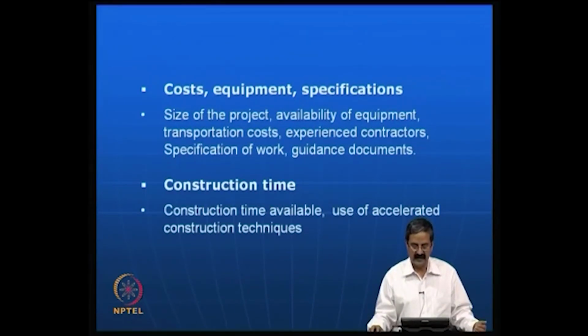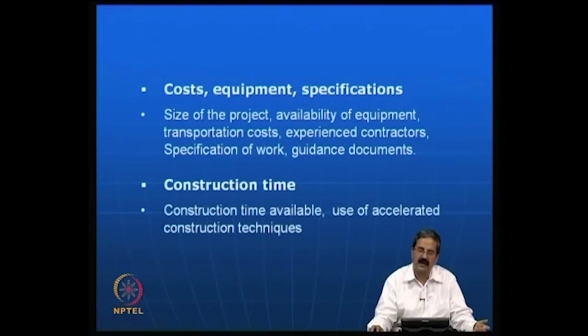Many of the ground improvement techniques need specialized contractors. It is not easy, because in soil mechanics or geotechnical engineering, you need to have a lot of experience in soils, otherwise the project will be in serious problem. I must tell you many examples in our own case. Soil nailing, you do not have good contractors. Micropiling, you do not have good contractors, but if you have good contractors, they are very expensive. So, the owner is always worried: should I go for a contractor who can give me a low price but I am not sure about the quality, or go for a good contractor where we are assured of the quality, but at the same time he is expensive.